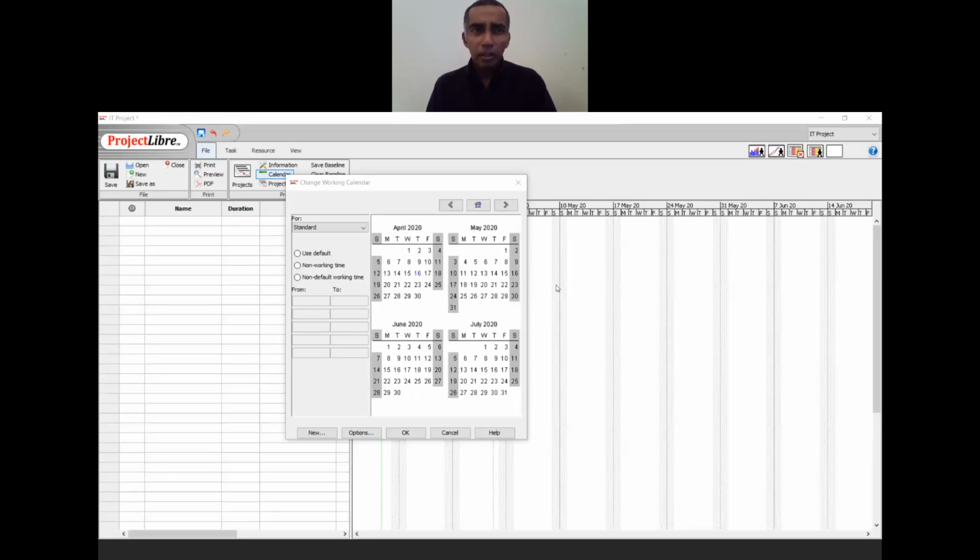So I am now back to ProjectLibre. So when I look at this ProjectLibre, we have May 1st as a holiday, right? It's Labor Day. So what you do is you click at May 1st and then change May 1st to become a non-working time. And you can see a red color here, which indicates that it's actually a holiday. Next one is May 7, right? May 7 is supposed to be Vesak Day. So you click at May 7, make that a non-working day, right?